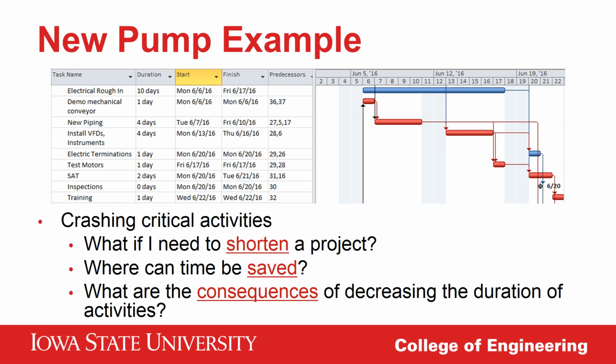This work is electrical and mechanical in nature. Those types of contractors have multipliers that are pretty effective in modifying costs for weekend or overtime work. They even adjust for productivity losses of each worker when the days are more than 10 hours long.